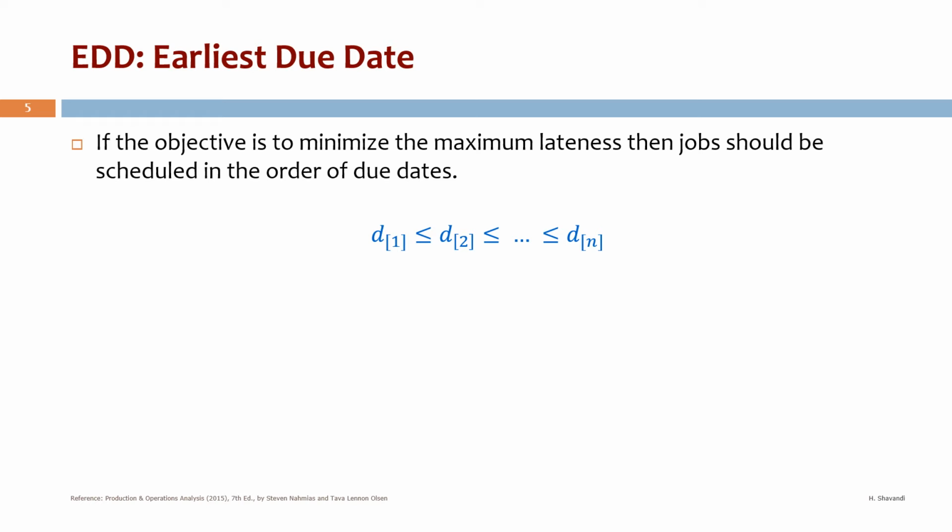EDD, or earliest due date, is the same as SPT, but here we schedule the jobs in ascending order of their due dates. So this will be our scheduling.